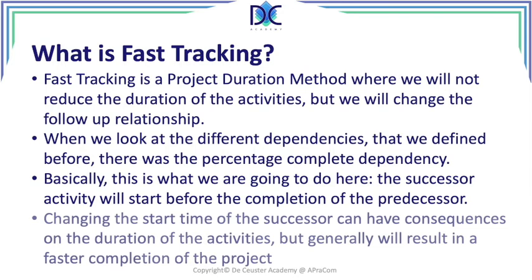But what we see is that we will be doing activities in parallel, and these activities done in parallel can have an effect on each other because there may be interference, which will have an effect on the duration of those activities. So when you're doing tasks in parallel, not in all cases, but in most cases, it will have an effect on the duration of those activities. Nevertheless, completing those activities in parallel will finally have a positive effect on the completion of the project.